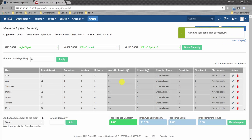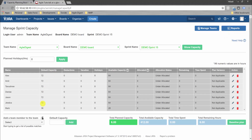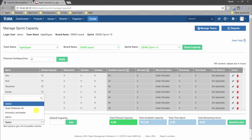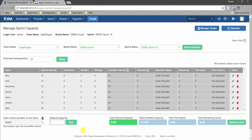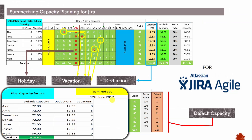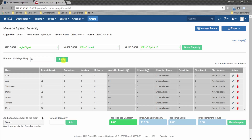We've now updated the default capacity for everyone — 72 hours each, and 36 hours for Mark. At any point if you want cross-functional team involvement, you can add that team member, give their default capacity, and they'll be added. Now we'll add the team holiday: 12th of June, eight hours off. After clicking Apply, all team members show 8 hours off in that column.